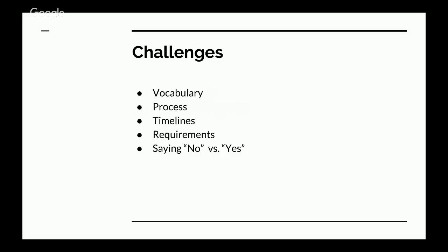In this case, something that we worked out. We all just assumed, because we'd worked together, that we knew the process we would take. And so it turns out that the client saved feedback for the very end of the project. What that meant was that we got to the end of the project, we'd received minimal feedback, all of it pretty positive, and then all of a sudden they dumped it on us. That was something that was a problem, because we weren't expecting it. It made us feel like we looked like a bunch of schmucks.